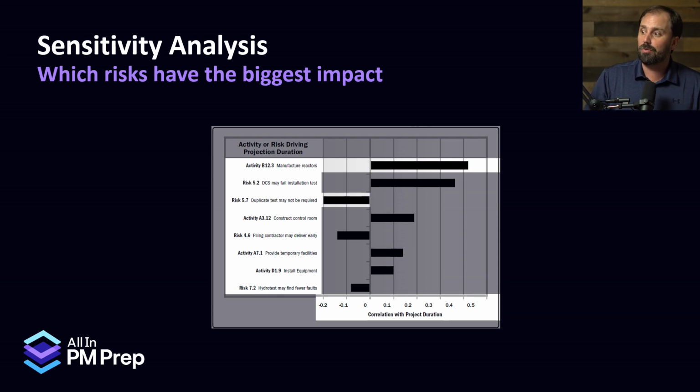Cool. Now, the other one that we drop down, the third one, we say if that happens, hey, the schedule goes shorter. It's on that side. So it just says, how does it rank on the list? This one has a positive, the other one has a negative impact, and how much, okay? How correlated it is to the output.